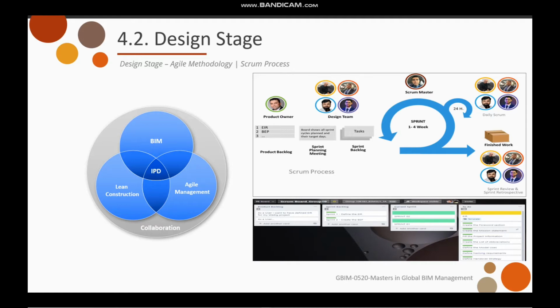What did you do yesterday to advance the design process? What are you doing today? And what stands in your way? To manage our Scrum process, we use the Trello platform to plan, manage, assign, and track tasks. Trello is quite suitable and offers different separated boards for different purposes.